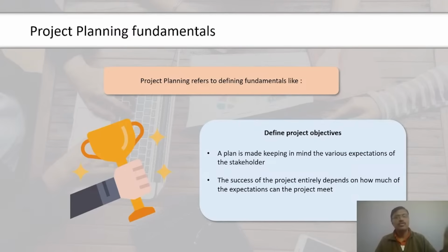Gantt chart is a type of bar chart that illustrates a project schedule. It shows the dependencies between the project activities as well as their percent completion. A sample Gantt chart is shown on the screen. 2 summary elements of work breakdown structure are depicted. To complete those elements, there are a number of activities under them. Some of these activities have dependencies. For example, activity B and C have a dependency. Activity C can start only when activity B is completed.